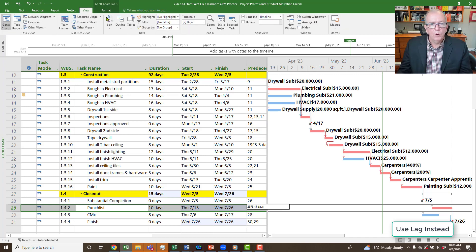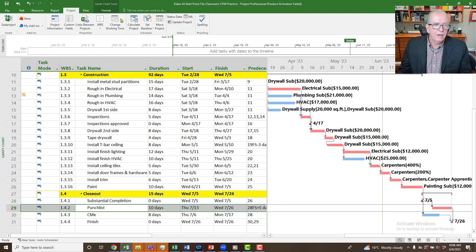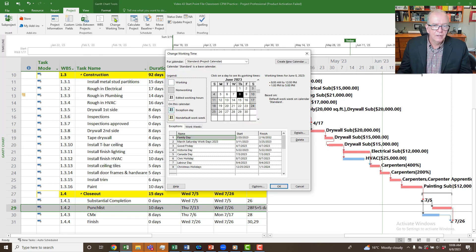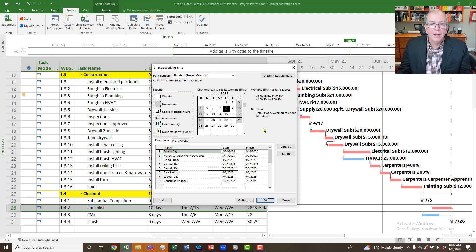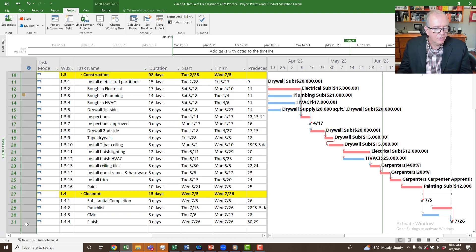So to summarize the troubleshooting steps for a disappearing critical path: one, check the Format tab and make sure Critical Tasks is turned on; two, check whether you've applied a special calendar to any activity and whether that's affecting the dates; and three, check the indicator column for the constraint checkered box and remove any unwanted constraints by setting the constraint type to As Soon As Possible.